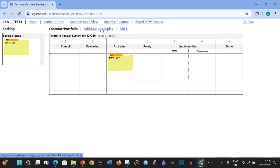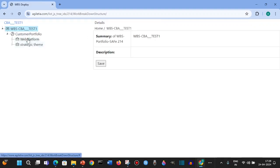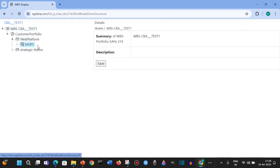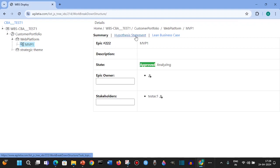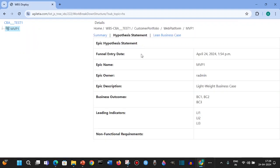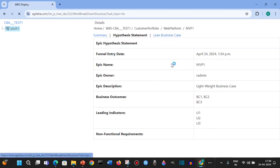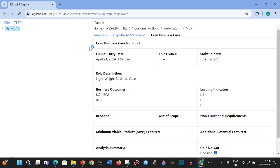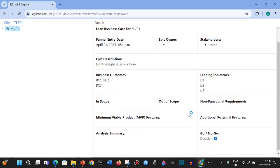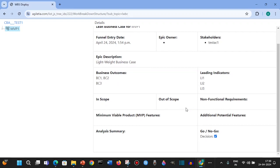If you go to this manage topic, you'll see that this is an epic. This is the hypothesis statement - a short statement with temporary values or test values. In this lean business case, like how we see in SAFe, you have all the details which can be filled in. This will be filled in by the LPM.